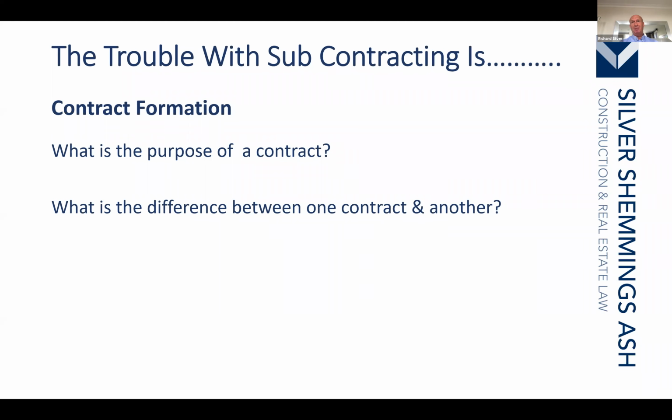The NEC, which you will know if you've listened to my seminars, I am often critical of. One thing I particularly like in the NEC is that it has Z clauses. Z clauses cover any amendment to the other clauses. It recognises that the contract as drafted in its standard form is unlikely to exactly match your requirements, and therefore you're going to amend it. It's my view that you always need to amend a contract. Those of you who are main contractors will be only too aware that it is a very rare occurrence where you get the main contract unamended. In some cases, it seems almost that the amendments are more than the original base contract.